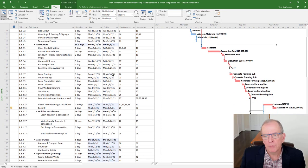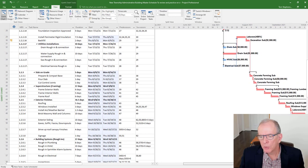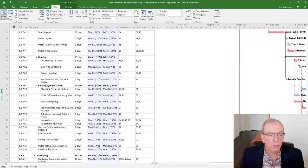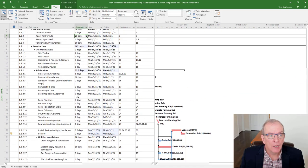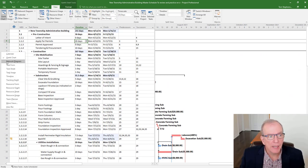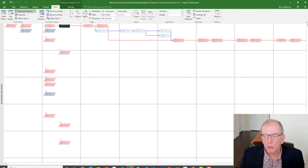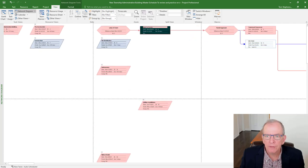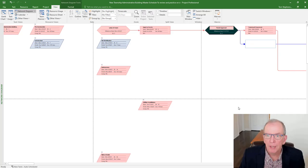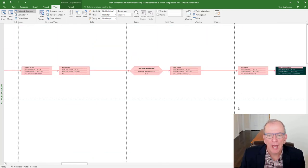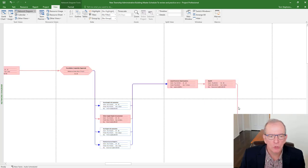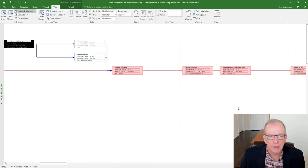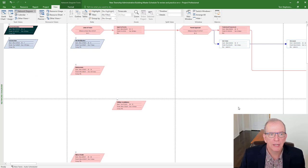So be pretty diligent to walk through your project. I usually will, I'm taking a page from lean construction methodology here where we talk about pull planning. I will usually walk it through backwards from the completion to the beginning and then I will walk it through forwards again and I will check it in the network diagram. And the network diagram is giving me the actual activities in a network block so I can see every activity and I can see their links and how they're organized.